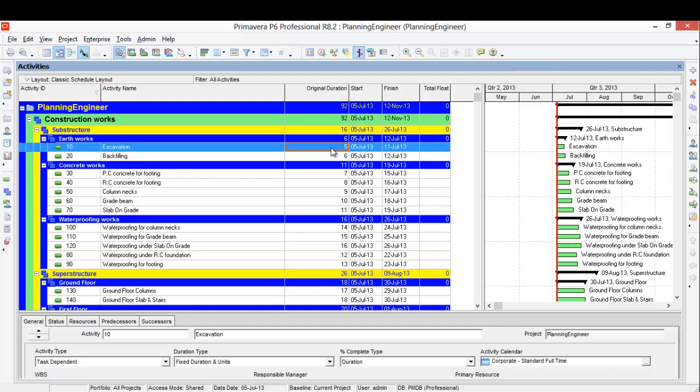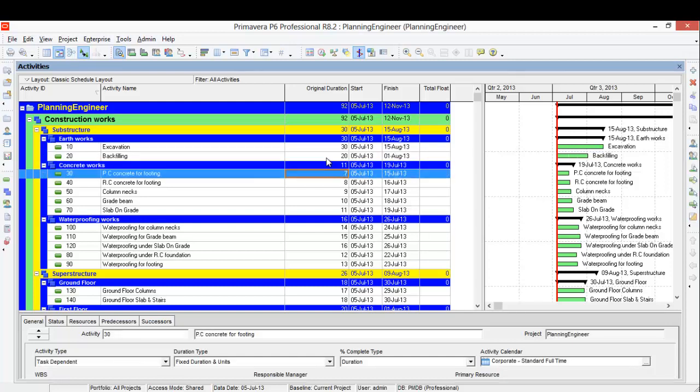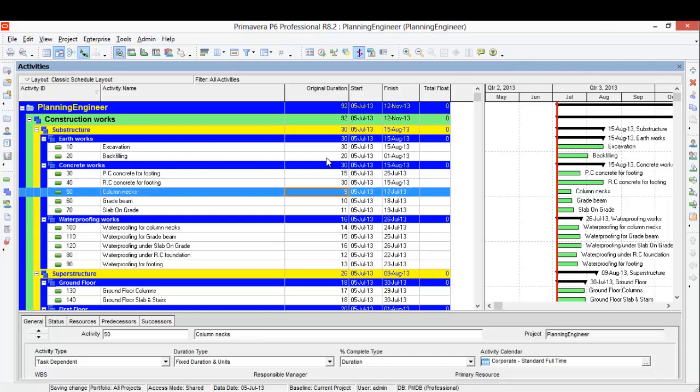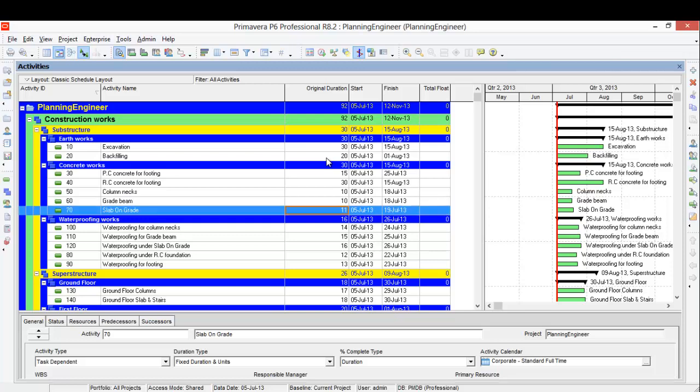I'll put here 30 days. You can change duration like this, just change it here: 30 days. Excavation: 20 days. Backfilling: 4 days. PC concrete: 14 days, let's say 15 days. RC: 30 days. Column: 10. Grid beam: 10. Slab on grid: 25.